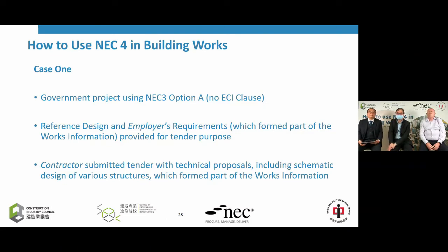Okay. Now, in this case, the employer introduced some reference design, or you can call it a baseline design. And it also incorporates some employer's requirements, because in NEC3 and NEC4, we don't say client, we say employer, okay? So these two, the reference design and employer's requirements, actually form part of the works information. And they are provided for tender purposes. The contractors are required to submit a tender based on this reference design and employer's requirements. They also have to submit, together with the pricing document, the technical proposals, including the schematic design of various structures, which also form part of the works information.